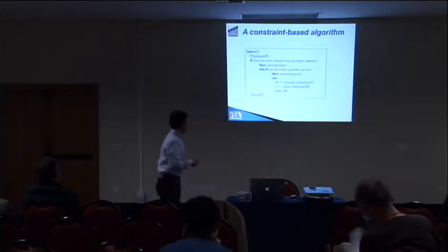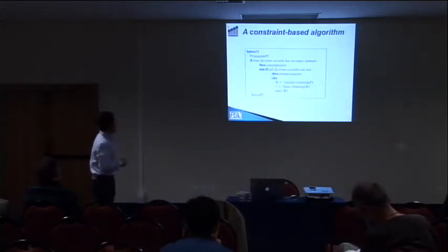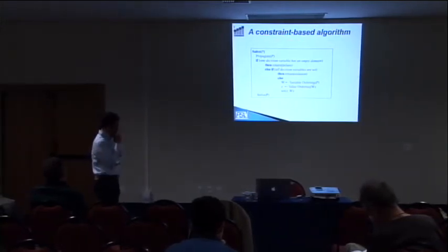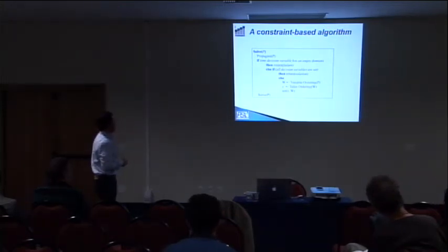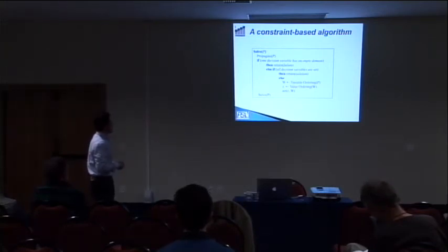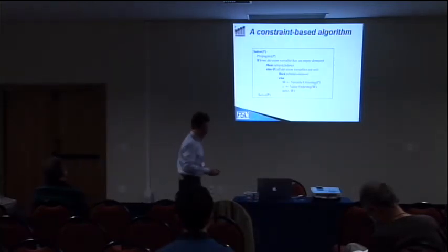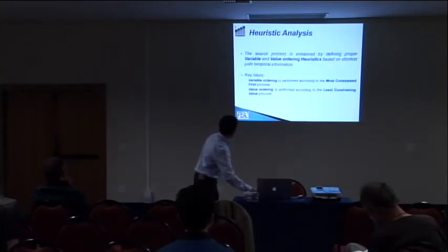So basically, the algorithm we are using is a classical CSP solver. We start with a propagation procedure. This means we apply the dominance condition from the previous slides to all the pairs of activities which require some resource. We prune the infeasible orderings. In case there is no empty domain, so there is no failure, we pick one variable on the basis of a variable ordering heuristic, and next we choose a way to order the chosen pair of activities.